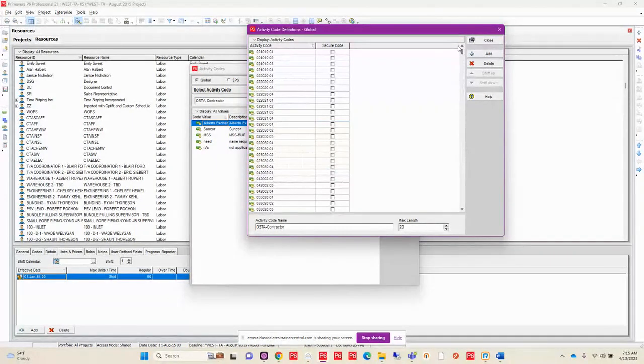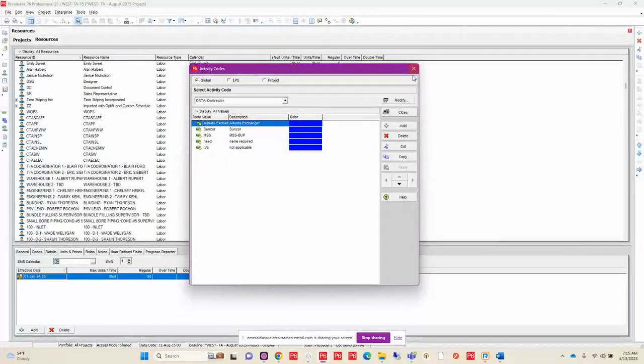I've got activity code over activity code over activity code, and some of these ones with numbers that may not mean a darn thing to me, but because I've imported those in without rolling them down to the project level, they are actually coming into my global activity codes, and it's not necessarily something that you want to have in your database, to have that abundant amount of activity codes that are out there. So just some of the pitfalls.